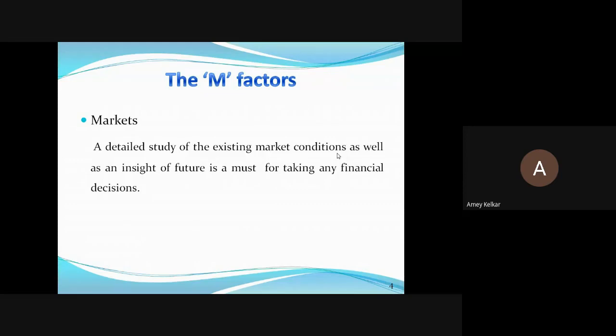Let me take an example of a residential complex. Say you are coming up with a G+5 residential building with some commercial outlets for the ground floor and first floor, with basement parking. With respect to this, how is the market important? What study you have to do first, before investing or taking financial decisions, is how much is the housing need in that area? Secondly, how much is the commercial need in that area? If there is a housing need which will satisfy the number of flats you will come up with, then comes the first step of acceptance.